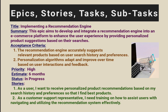Acceptance criteria example: the recommendation engine accurately suggests relevant products based on the user's search history and preferences. Personalization algorithms adapt and improve over time based on the user's interactions and feedback. Then comes priority — I have taken an example of a high priority epic. Estimate: 6 months. Status: in progress.